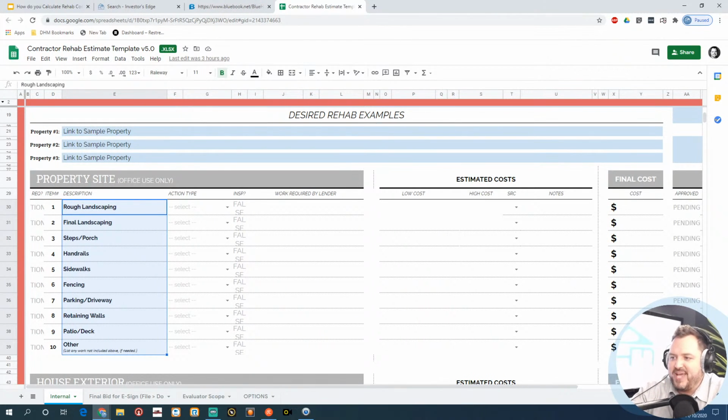This should be an all-inclusive price, not just the materials price. So based upon that, I actually don't want a price per square foot from the contractor. I want a price for the item from the contractor that he'll hold himself to. He should have been to the property. He can do his own measurements, and he can give me an item by item price. But I use the price per square footage method to give me a gauge if I should make an offer on a property, if it pencils or not. And then I bring the contractor in. So Israel, let me know if that's making sense. We're on the same page. If not, post some comments here.